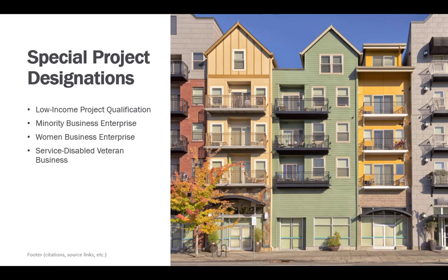workforce diversity designation. Furthermore, if a project is built on a site where development is complicated by real or perceived environmental contamination, including old landfills, former military, rail and heavy industrial facilities, and designated brownfields, they may request a special brownfield reuse designation. Lastly, projects that include farm use on the project site and obtain approval for dual use development may request a special dual agricultural use designation.